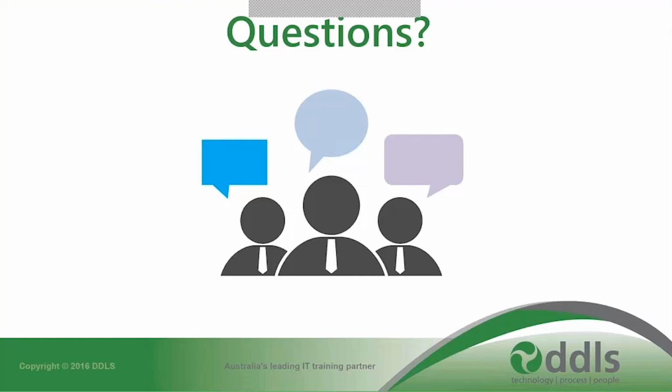Even in the Agile PM course, there's actually a little project approach questionnaire, which is called the PAC, and it gives you a list of questions where you put little ticks and crosses against whether this particular project of yours is good for Agile or not, because it's not suited for every type of project. It depends on project to project circumstances. So you might want to have a check of that particular PAC, project approach questionnaire. If you drop us a line as well, happy to send you a one-pager of that so that you can see whether your project is suited.